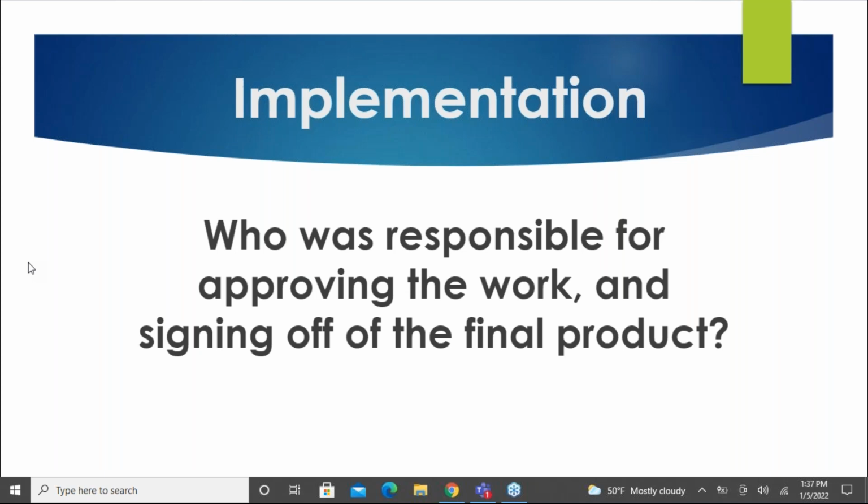For us, a lot of that's done in requirements analysis. When the first request comes in, someone will say, I want to do this. Then we go through the full requirements with the business analysis effort to figure out what data we have that can actually support the answer to that question. Then we develop some sort of gap analysis, see what we need to add, and go through the steps to actually create that data, whether that's bringing a consultant on board or some subject matter experts to create it. That's really how we go about it. We don't build anything that doesn't have the support under it. We go through all that effort first before starting to write any lines